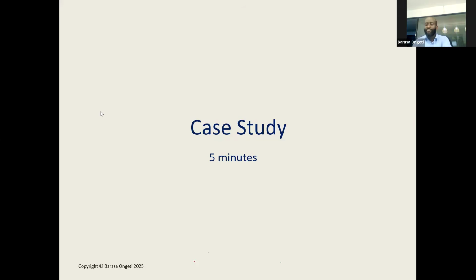Let me start with this one. So we have substantial completion, and final completion. Please enlighten. Mr. Matthew Ochoria. Substantial completion is an industry term. It's not defined in FIDIC. FIDIC does not have any term called substantial completion. People use it though, because if you look at clause 10.1, it says, if the contractor considers the works have been substantially completed. So people say substantial completion, and it's become a defined term, but it's not defined in the contract. But basically, it just means the contractor considers that these works can be used, okay?